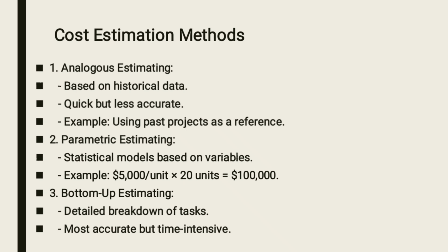By the end of the day, you come up with the total amount of your budget based on the budget for each task. This one is most accurate and very good because each task has a budget assigned to it. But it is time intensive, because breaking your project down into small tasks is time consuming.